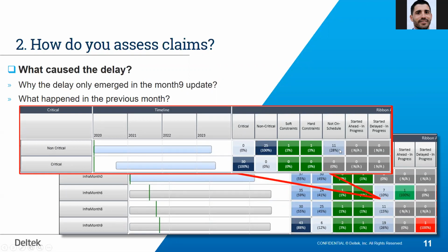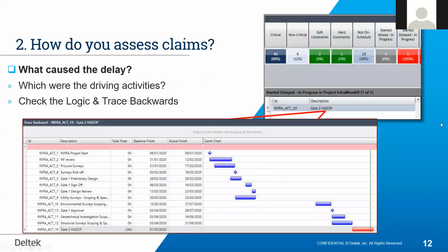path. So what happened there is that if I was focusing only on the critical activities, I missed the point that there were some non-critical activities that were getting very, very close to near critical. And eventually they pushed the delayed activity that was also originally non-critical into the critical path. And these non-critical delays cause the domino effect that now affects my critical path. So that's what we see here.